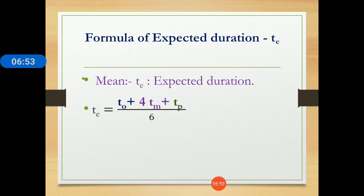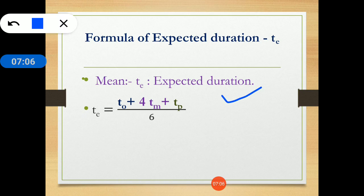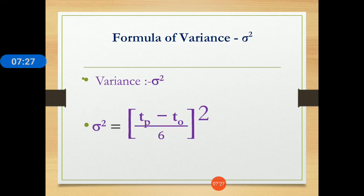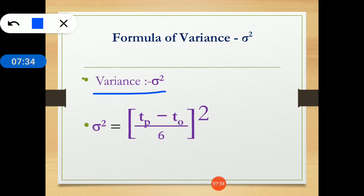You need to memorize two formulas for the PERT method. First, calculate the mean time or expected duration TE using the equation: TE = (TO + 4·TM + TP) / 6. This gives you the expected duration. Second, variance sigma-squared is calculated as: σ² = ((TP − TO) / 6)². This equation gives you the variance.